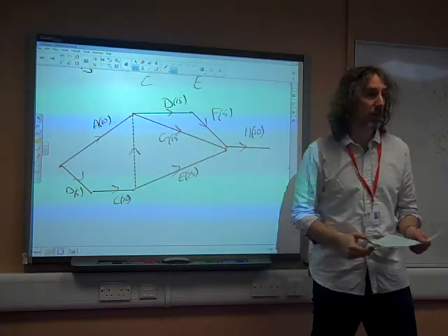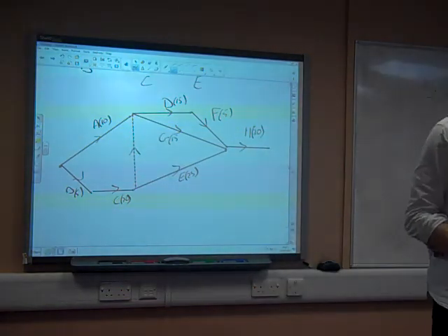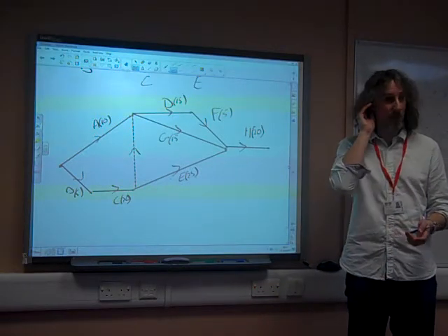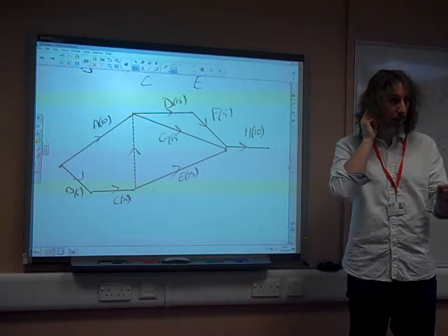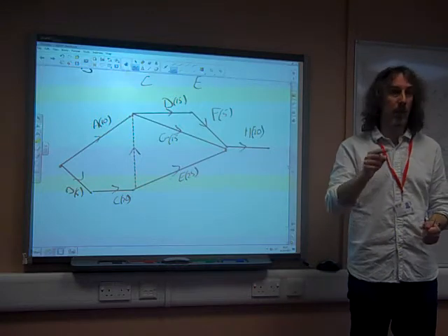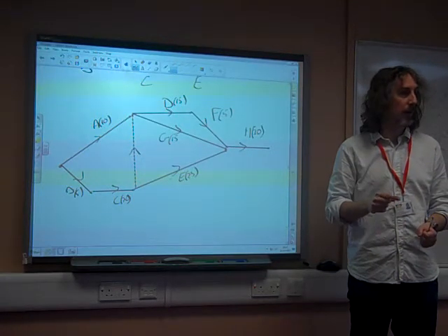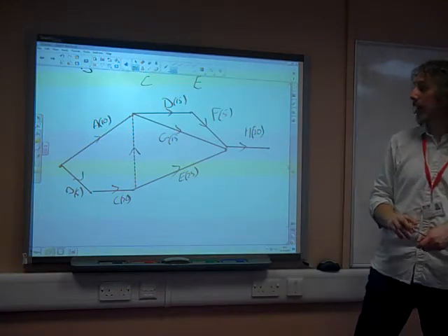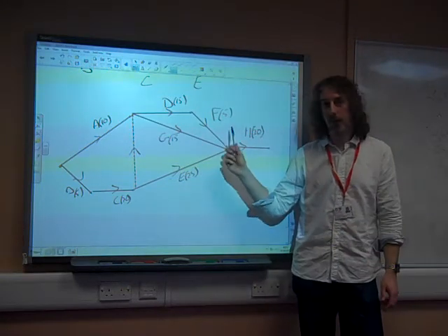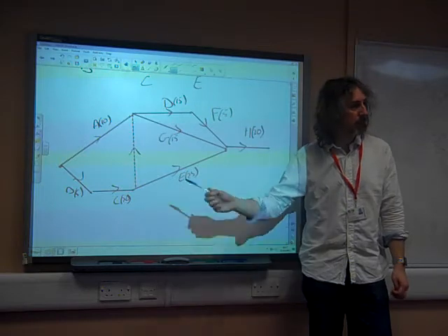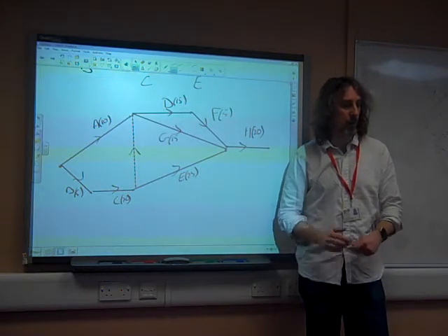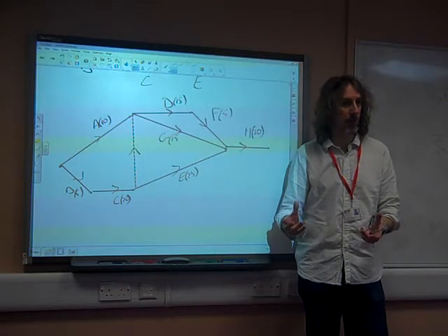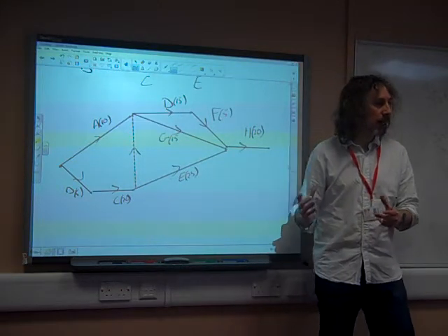Okay, now amongst the important things that go on here, actually it's worth taking the time to get this right, and crucially is getting the right number of dummies. Because if you have more dummy activities than you need, then it's going to make the next stage of doing the forward and backward scan through it much more complicated, and you're likely to make a mistake if you have extra dummies in there and things won't match up.